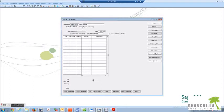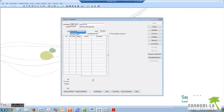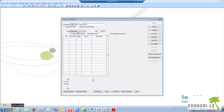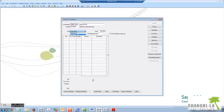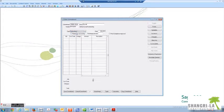Now that we've entered the vendor, tab to the type. It's either going to be a subcontract or purchase order. The vast majority of our commitments are subcontracts. Purchase orders are for materials that we buy directly, which is not common, or an architect. The purchase orders are subject to negotiated terms with either the supplier or the architect. Subcontract - we have our subcontract form and documents that we control and send out.